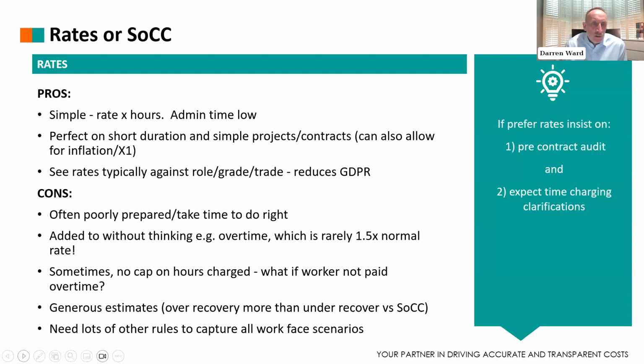Because that all sounds too good to be true, doesn't it? I don't know, but the cons of it. Firstly, rate cards are very often poorly prepared and they take time to do right. People add to them without thinking. So, a good example: Joe Bloggs is £30 an hour, his standard rate. Someone adds in an overtime rate, £45 an hour, because he's paid at time and a half.